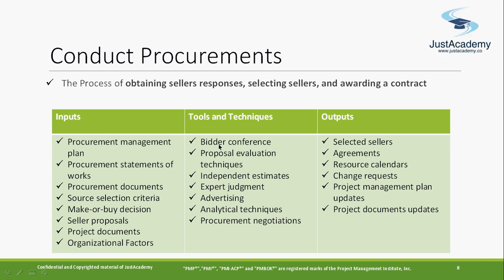The most important part from this topic is the bidder conference. What is a bidder conference? We're going to call different vendors into the conference room, and we can answer their questions on the specific requirement that we have raised, so that every vendor has a fair idea about the requirement and to avoid any bias. Different vendors can ask different questions about this requirement, and you can answer them. Everybody will have a fair idea, and after the bidder conference, they can submit their proposal. That's basically the bidder conference.